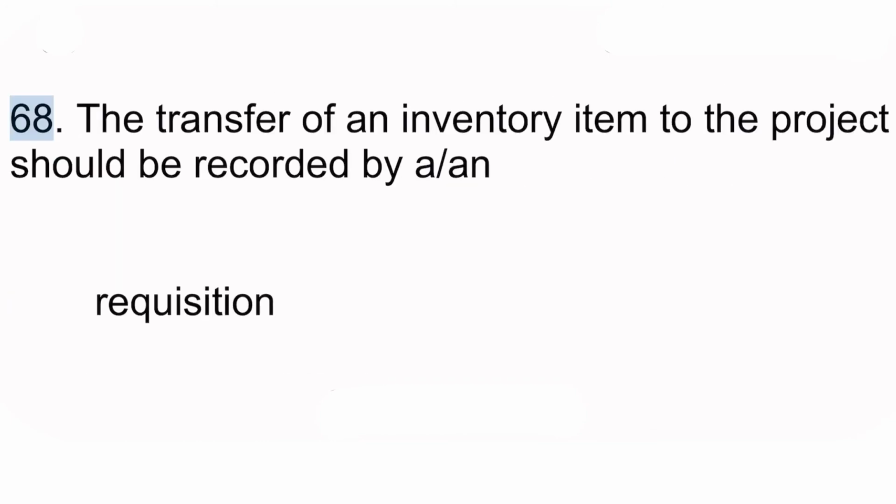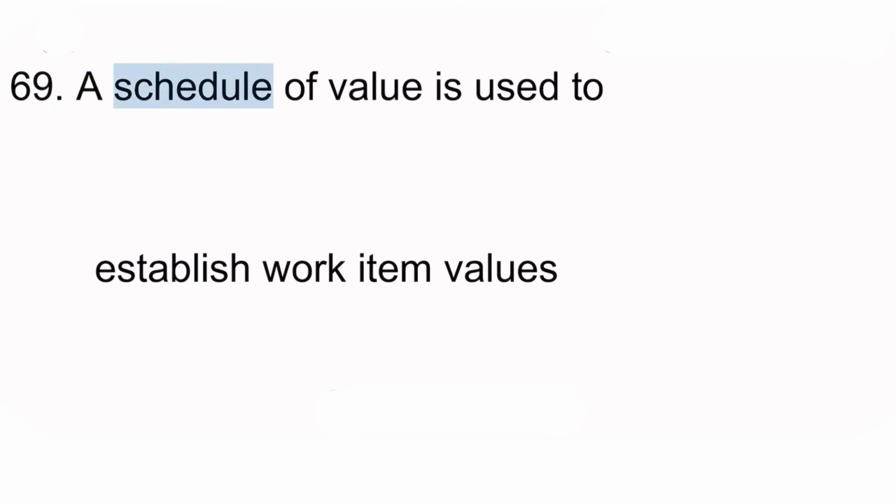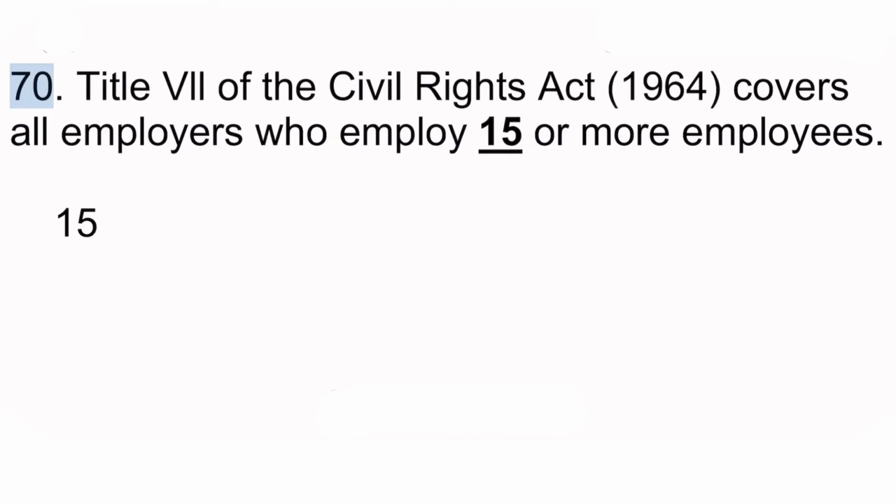68. The transfer of an inventory item to the project should be recorded by a requisition. 69. A schedule of values is used to establish work item values. 70.